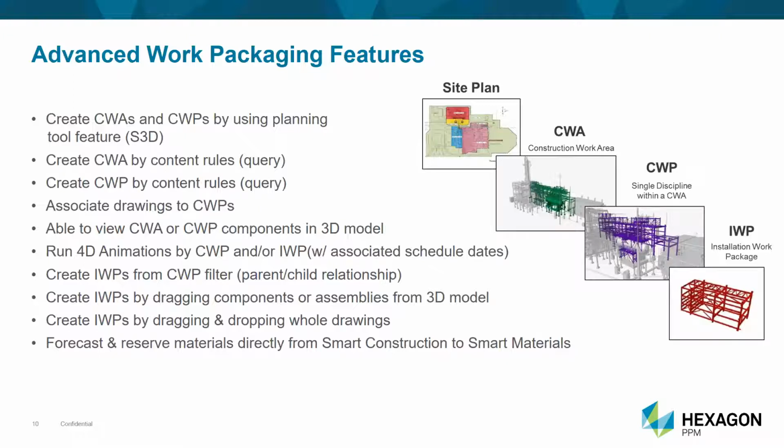And the nice thing is you can run it as a scenario. You can tweak your sequencing and your dates according to how you scrutinize and you do your reviews. Rerun it until you're satisfied with it, and then there's a capability to actually push that revised information back to P6, either through an XML or straight into reflection, so it can be reviewed before it's actually brought back into P6.